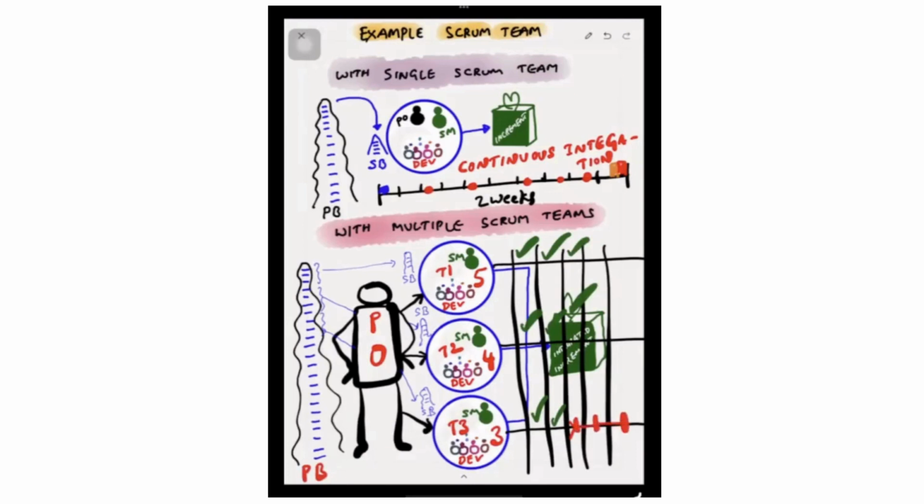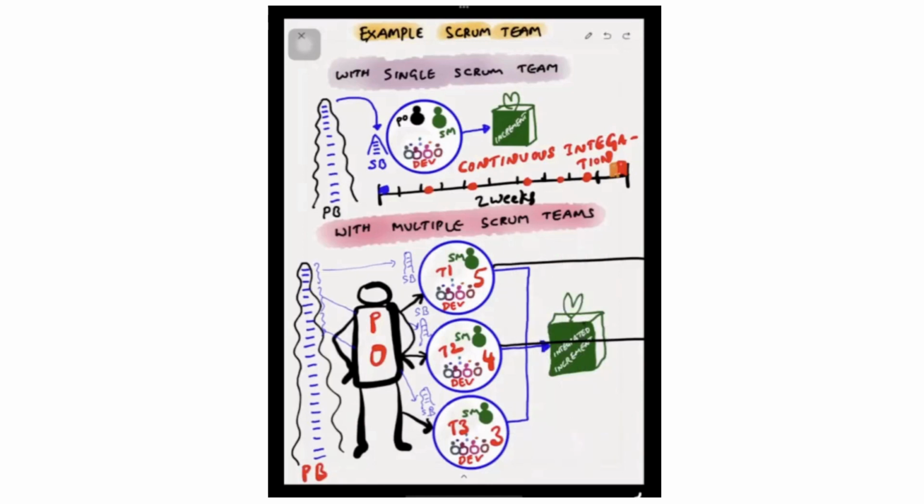Because of that, the other two teams, team 1 and team 2, are in one synchronization cadence and team 3 is in another. In this situation, team 3's next sprint can be either a shorter sprint or a longer sprint. For example, if they canceled their third sprint on day 3, their next sprint can be 7 days, so that by the next to next sprint, everybody will be in the same synchronization and cadence. And if they cancel the sprint on day 7, then their next sprint can be longer, like 13 days, so that by the next to next sprint, they will all be in the same synchronization.